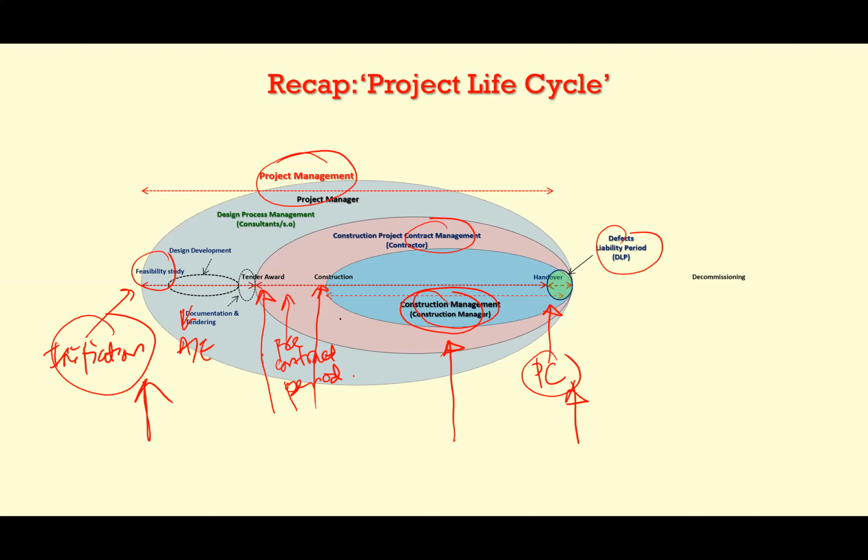Feasibility study has costs that you need to pay to the consultant, and then the architect and engineer have to be paid certain fees, and then construction, for sure the contractor will get payment based on the construction cost plus whatever profit, etc., etc. If we can evaluate each of those costs, then it will sum up. Okay, it becomes a life cycle costing.